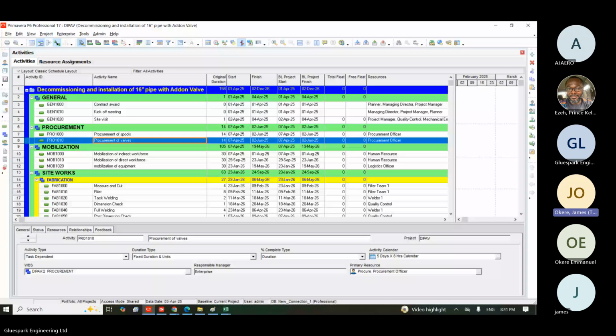You understand? So even when somebody asks you, but I thought these guys have done it, you say yes, but you have not verified it. That's why you couldn't ascertain that update. But however, you have progressed to so and so %, right? So it is accepted in the industry. Instead of you to overshoot your schedule, you can downsize it, on the ground that you want to validate before you update. Everybody will understand. Okay, I don't know if that's clear.